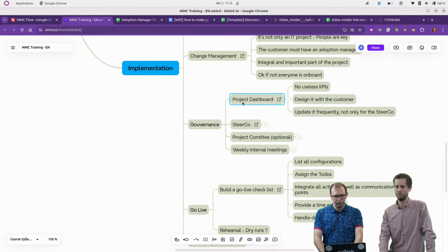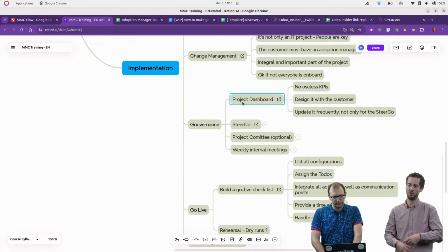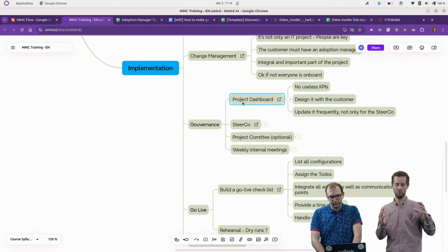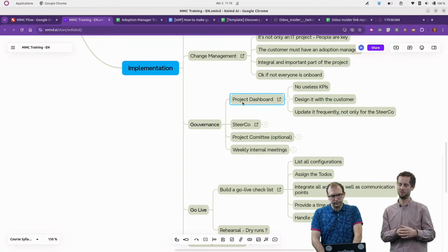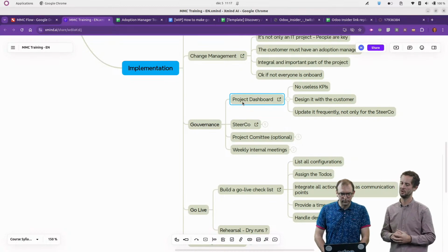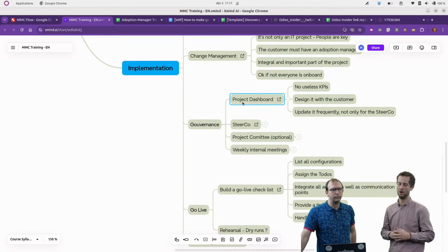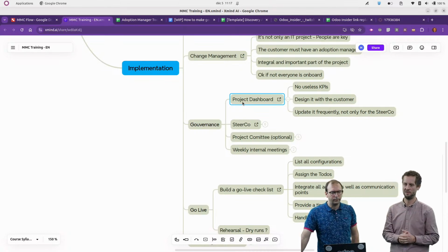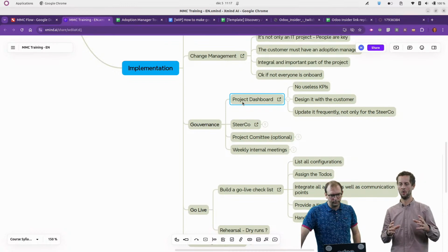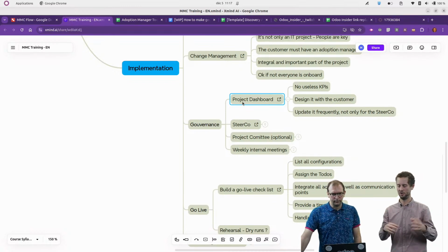Yeah, that's really what we try to avoid, the big bang, because it's quite a risky approach. But when we have no choice, of course, we go for that. But we always try to minimize risk for the client, and we try to find the best approach. Either we go for the entire application in one shot, but we try to say, okay, maybe one company out of the maybe 5 companies we have in the group, or we go for one app for the entire company, or the entire group, sorry.